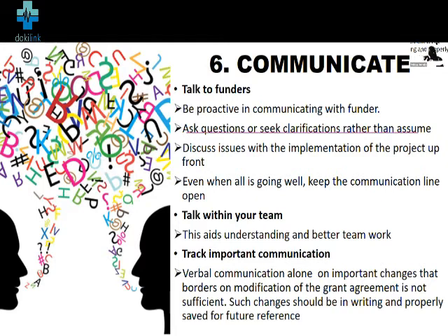That communication must be written. So instead of a phone call, where the man says, okay, you can go ahead, no, insist on getting an email, insist on getting a text message, even a WhatsApp message that you can show later on, that you can make reference to when the chips are down.